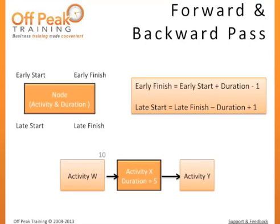While most modern scheduling tools will automate the calculation of critical path, it is useful to understand how the technique works so that you can troubleshoot conflicts and rescheduling needs. We will explore this method using a schedule network diagram. We will look at each activity or node to determine four key pieces of information needed to calculate the critical path using two steps: a forward pass and a backward pass. Our first step, the forward pass, will be used to find the early start and early finish for each node on the network diagram.